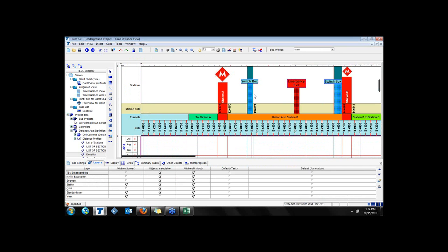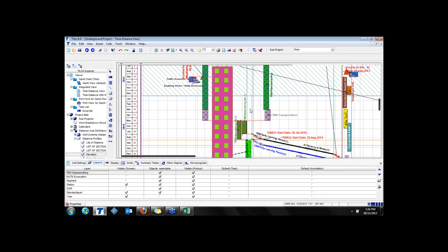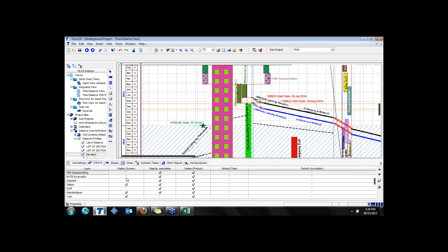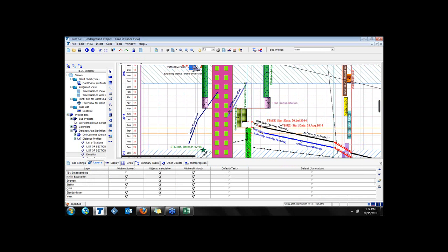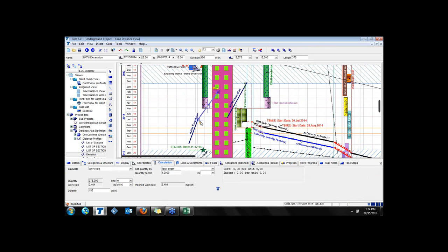And in addition to TBM works, you can also show your atom excavation works. Please see that these are the open cut method which you are doing in your works. So when you work, you can also use atom excavation, and these activities can have work rates. So the works are harder, doing cut and open. Here please see that daily 2 meters is allowed to work.